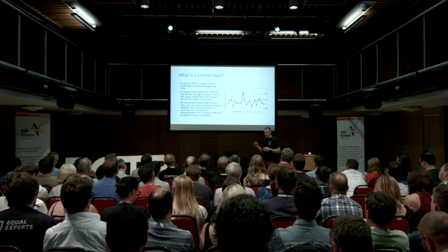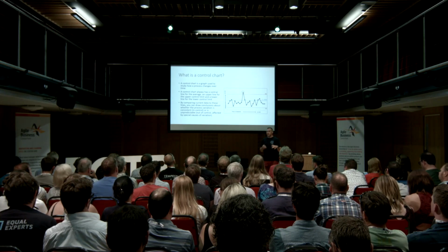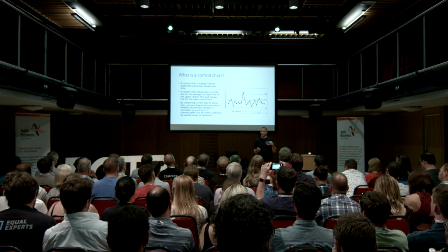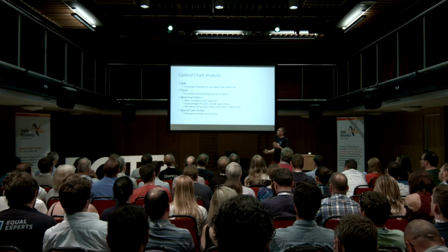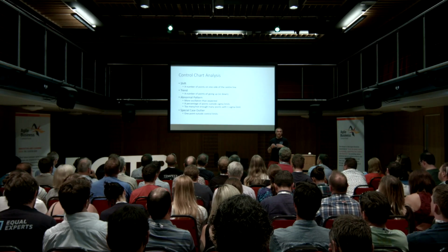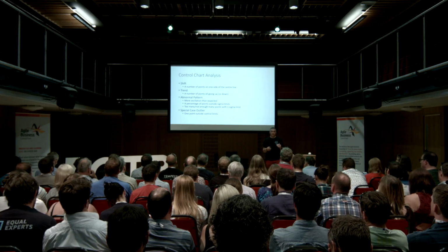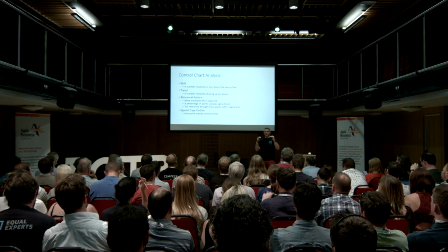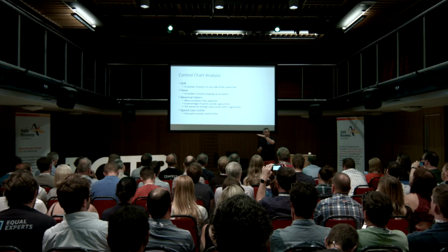And the nice thing about using control charts to look at processes like velocity is there's a lot of statistical analysis that you can do on that control chart to start looking for outliers. The outliers you can look for are broadly split into 4 different categories. So you can look for a shift in the data. This is where you've been going along with a process that's in control and then something's happened and it's either shifted up or shifted down. So it's a good or a bad thing. And then it's carrying on in control.